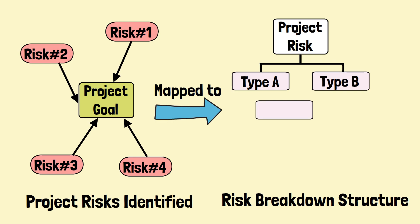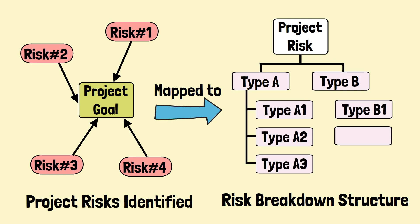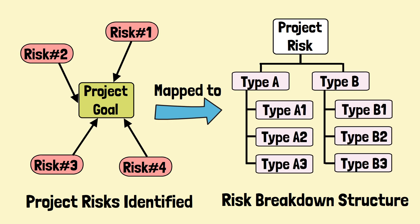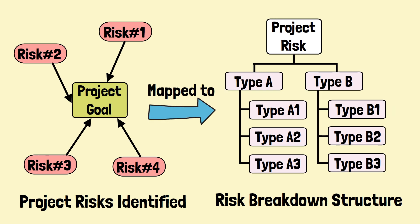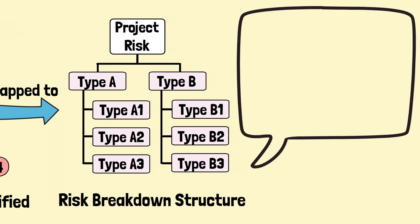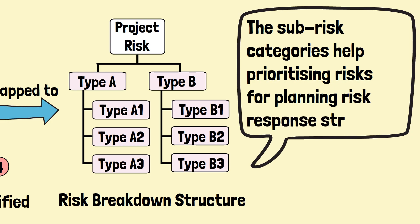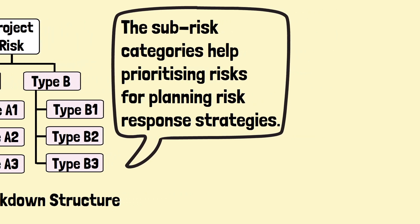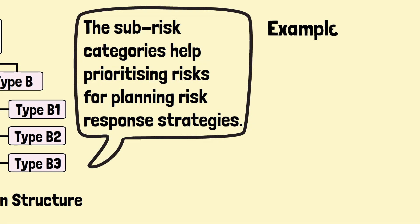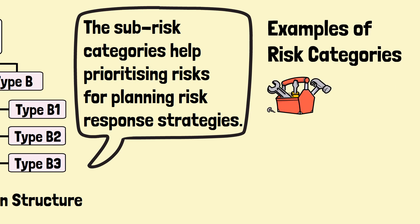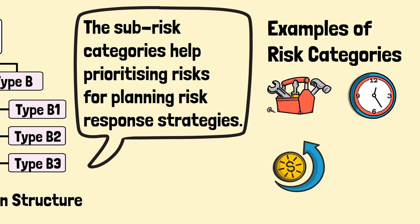It breaks down these risks into smaller, more manageable categories. This makes it easier to identify and prioritize risks and develop effective risk response strategies. Common RBS categories include technical risks, schedule risks, financial risks, and resource risks.